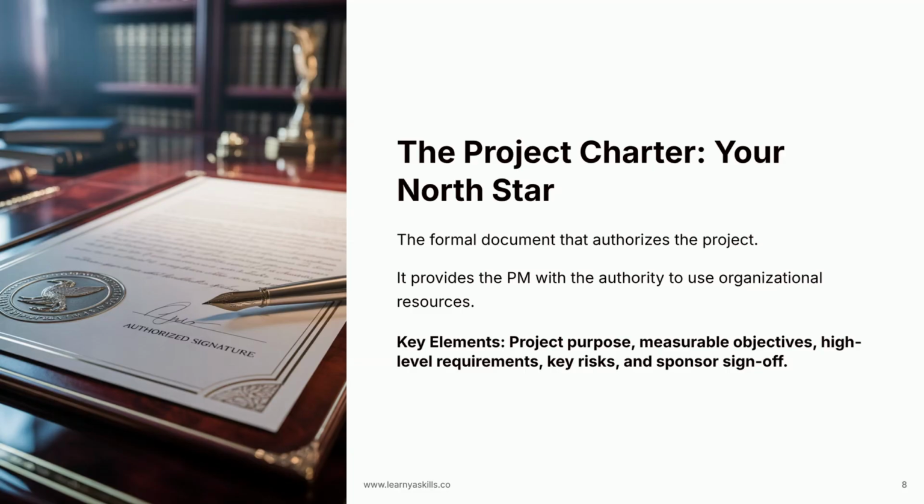The project charter is the single most important document in the initiation phase. It is the formal document that officially authorizes the project to exist and gives you, the project manager, the authority to apply organizational resources to project activities. It is your North Star. Key elements always include the project's purpose, its measurable objectives, high-level requirements and risks, and most importantly, the signature of the project sponsor, which signifies formal approval.